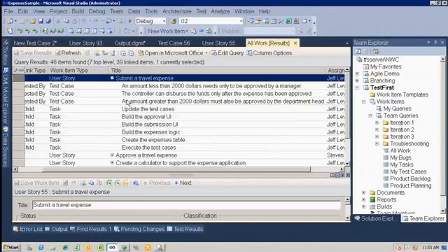In terms of the staggering of work, I like to have testers start a day or so early so that they can do this. So at the end of the last sprint, there's one team that I have been coaching that is doing this. The testers, because they never find bugs at the end, actually have some free time at the end of a sprint. I have them starting to write up test cases for the next sprint. It becomes a little easy. Sometimes developers get distracted with the new stuff coming in because they see it in TFS. But a slight schedule change gets you out of that problem.